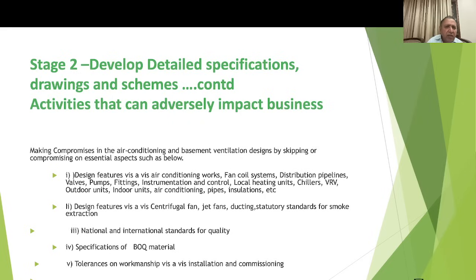Stage 2 is developing detailed specifications, drawings, and schemes. Activities that can adversely impact the business here include making compromises in the air conditioning design by skipping essential features such as fan coil systems, distribution pipelines, valves, pipes, fittings, instrumentation and control, local heating units, chillers, VRV outdoor and indoor units, and pipe insulation. For ventilation design, compromises regarding centrifugal fans, jet fans, ducting, statutory standards for heat and smoke extraction, specification of BOQ materials, and workmanship tolerances are also problematic.